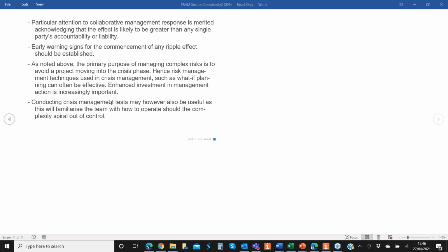Yeah, I'll have to have a think about that and see. I agree. I think there is something there. I'm just trying to work out what the dimension is for what makes it. What can we say around decisions in a complex? I think sometimes, on a smaller project, you'll be able to terminate a risk, whereas on the complex ones, you may well not be able to, and have a residual which you'll have to manage. Do you see what I mean?